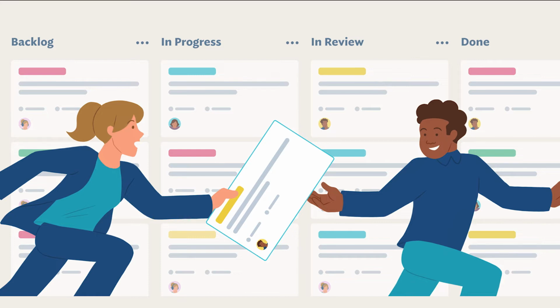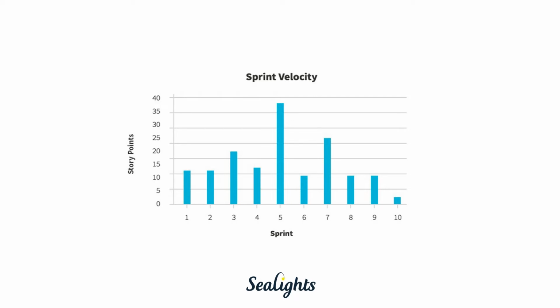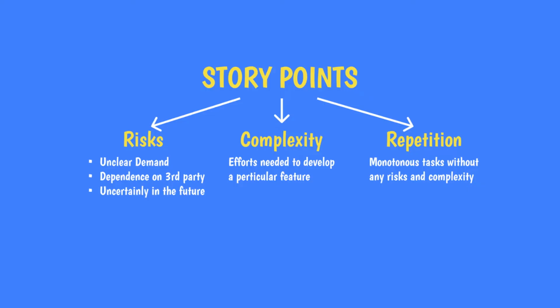In normal life, life happens. But if it ends up being a habit, that could be a problem, such as maybe you're scoping too much for yourself. When you first start doing sprints and completing tasks, it may take a bit to see what you can do with the time you have dedicated to your project. It may take a few sprints to find your velocity or number of points or tasks you can take per sprint. To help track your velocity, you can assign points to your tasks. This is super helpful to figure out how long it'll take to complete a task.